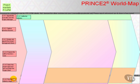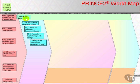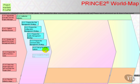And finally, plan the initiation stage. The results end at Authorise Initiation, which gives rise to: prepare the Risk Management Strategy, prepare the Configuration Management Strategy, prepare the Quality Management Strategy, prepare the Communication Management Strategy. Then combine the project's four strategies and the project's required result and approach in setting up the project controls and then create the Project Plan.